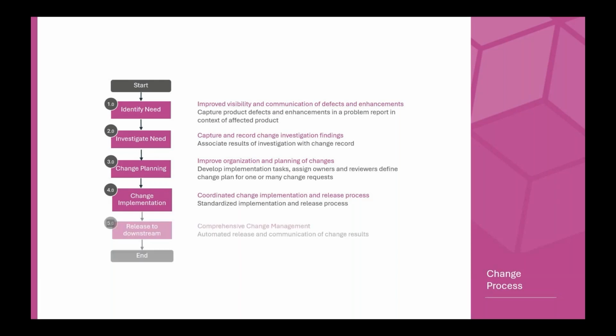Once we've carried out that, the final thing to do is to release that to downstream. So we might want to first of all do a change audit, review everything that's been carried out, make sure it's all up to spec, and then we can release that out to the downstream. Maybe that's releasing it into systems such as your ERP system, or notifying suppliers. So at a very high level, that's the change process. And as I said, we can cherry pick and tailor this to